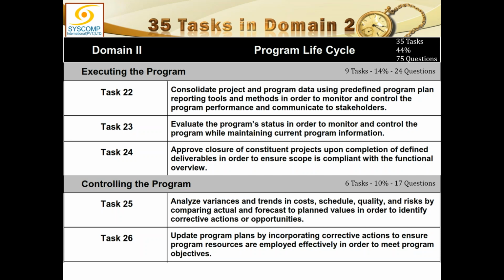There are certain benefits which could have started being realized while the project was going on, but all the benefits of the project will not be complete by the end of the project. When the project is being closed, not all the benefits will have been realized. So these benefits will be taken over by the program for all these projects, and then the program will be responsible for getting those benefits realized.